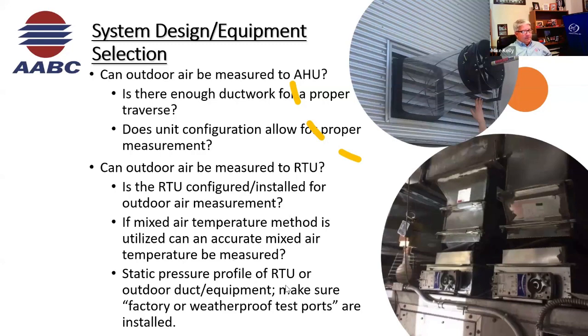Static pressure profile of the rooftop unit, outdoor duct equipment: make sure factory or weather-port test ports are installed. Yeah, that doesn't happen a whole lot. We like to ask for them. We take statics on every piece of equipment, because if I don't see test ports and plugs on our equipment, I'm assuming we didn't take pressures, and that is never a good thing.